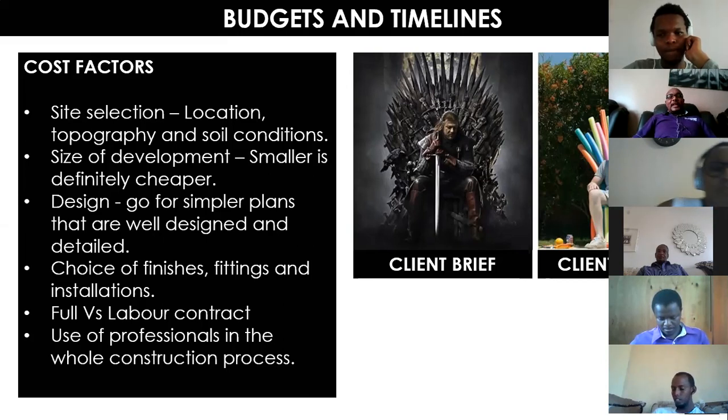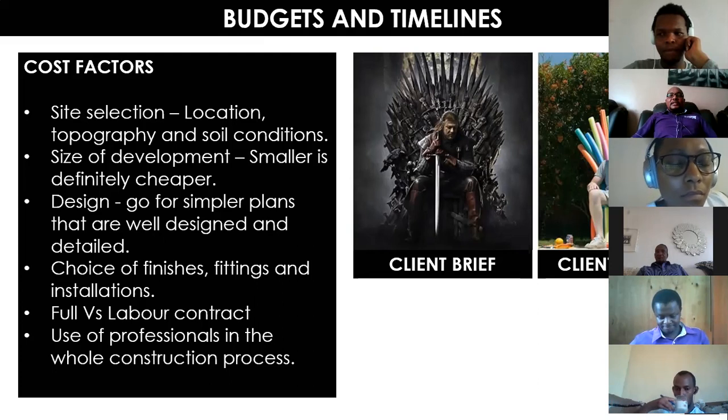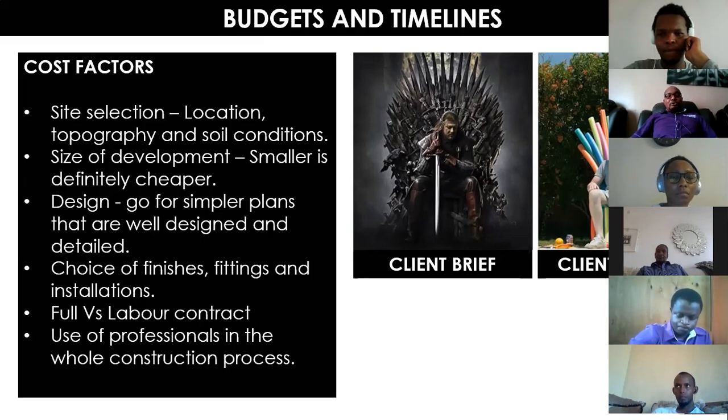And the example I like giving is between shingles and stone-coated tiles, because with stone-coated tiles, the cost is almost half that of shingles. But you can get some tiles that give you a profile that looks like shingles. So you end up getting a look that is almost like shingles, different, but at a much more cost-effective cost.